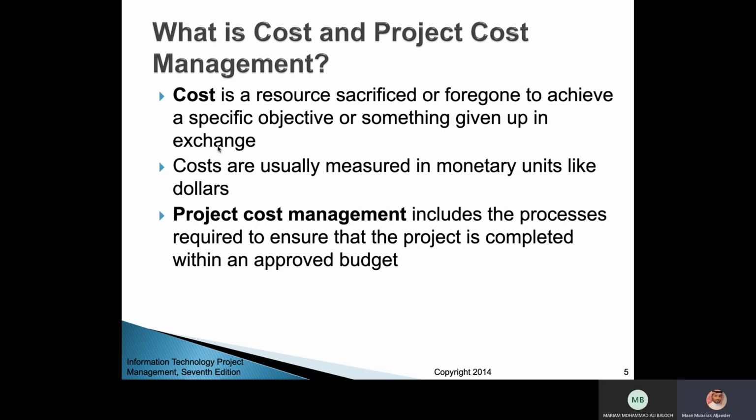And we have talked earlier about the variances, where you compare the plan and the actual work. In cost it is the same. You have budgets, and budgets are plans. And then you have the actual cost, the actual expenses that you spend. Then you compare them according to the timeline that you have, and you see if you are meeting the plan or not.